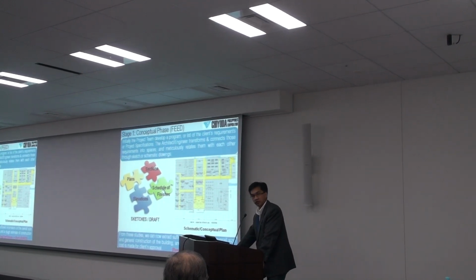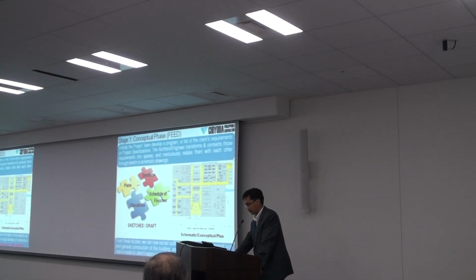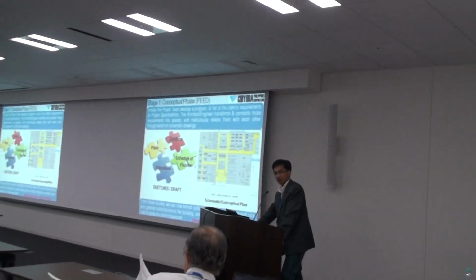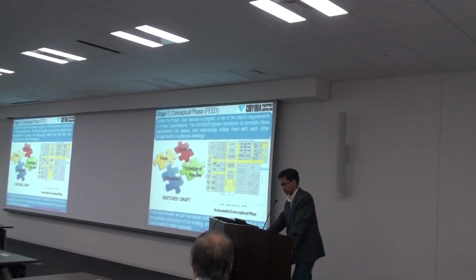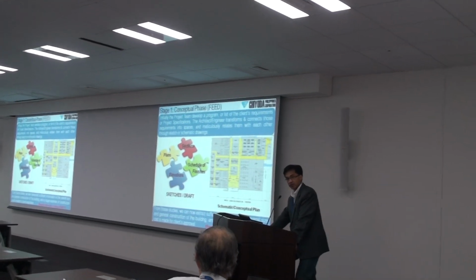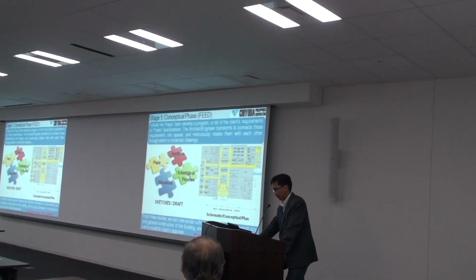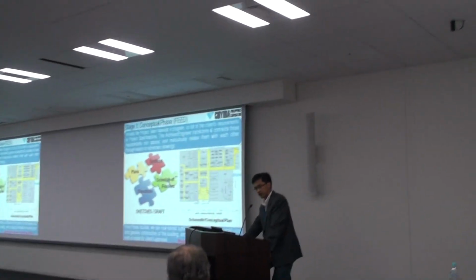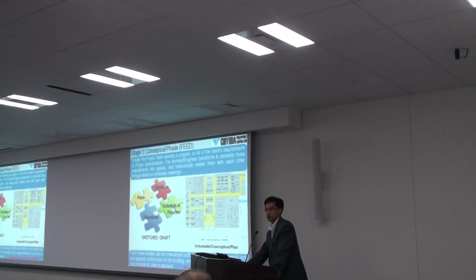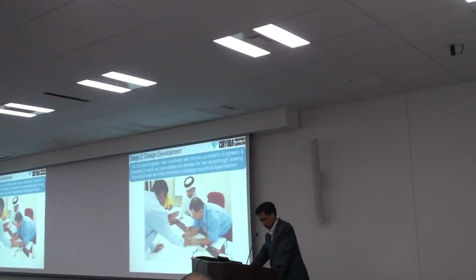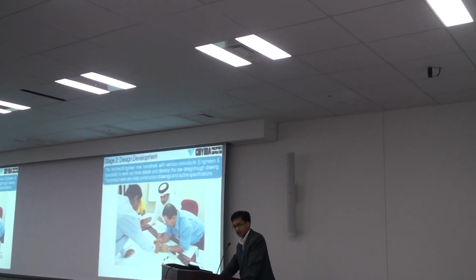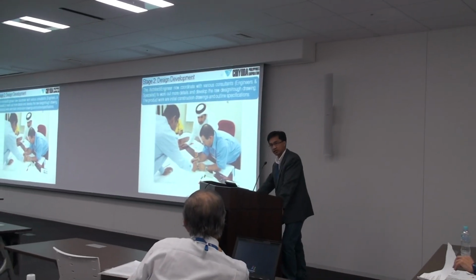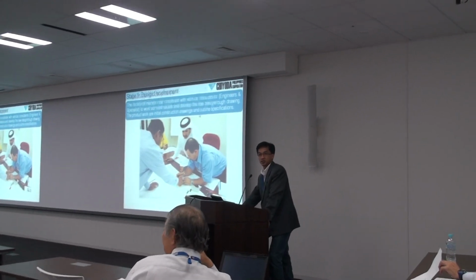From this study, we can now extract sufficient information for the overall size and general construction of the building, and a rough estimate of the building construction cost will be made for the client's approval. So if the rough cost estimate is less than or equal to the client's requirements, or client's budget, we go to the next step.